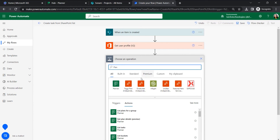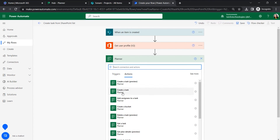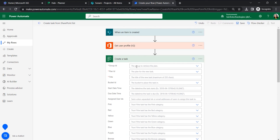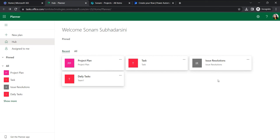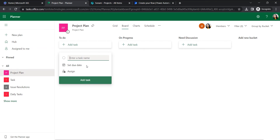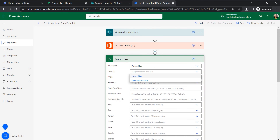To create the Planner task, searching for 'Planner', under the Planner connector we select 'Create a task'. Here we provide the Group ID. There are different types of groups, so let's select 'Project Plan', so whenever an item is created in the Projects list it will create a task in the Project Plan. Select the Project Plan group and the Plan ID should also be Project Plan.